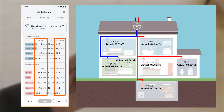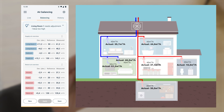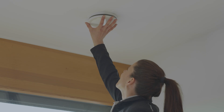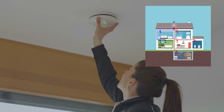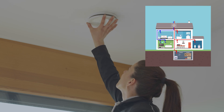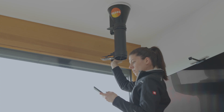A particular advantage of the application is the specific recommendation for action. This indicates which outlet is to be adjusted in each measuring round. The defined outlet in Living Room 1 is adjusted on the basis of the recommendation — the valve must be adjusted to reduce the volume flow.